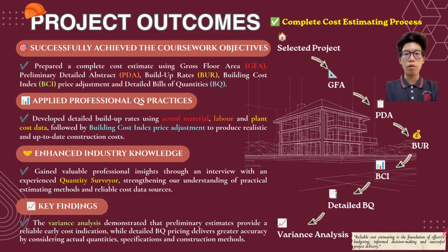In addition, our interview with a professional quantity surveyor provided valuable insight into practical estimating methods and reliable cost data sources, strengthening our understanding of professional quantity surveying practice. Finally, our variance shows that preliminary estimating is suitable for early budgeting and feasibility study, while detailed bills of quantity provide greater cost accuracy, and this highlights the importance of selecting the appropriate estimating method at different stages of a construction project.